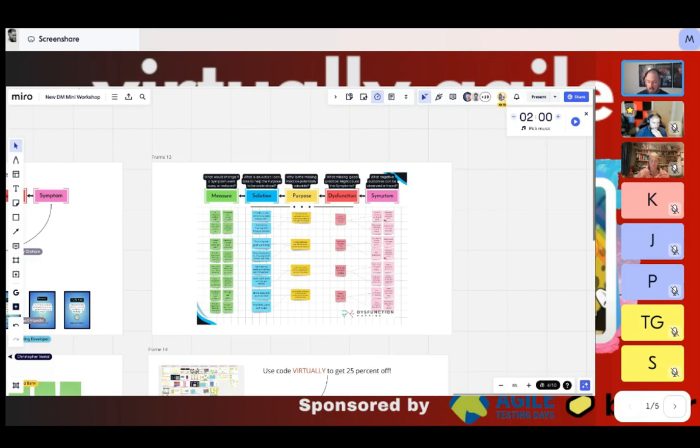Sarah asked, how do you tackle these things? Do you do it all at once? Your judgment is going to matter here, but I would generally suggest picking 1 or 2 things at a time, because if you try to solve too many things at once, you won't necessarily know how they relate. Does this thing fix that thing, or was it actually something else? So you might come up with lots of ideas, but pick 1 or 2 things to take a small action against and then reflect. Always try to aim at what you think are the most impactful things. The things where the largest number of symptoms lie is usually going to be a great way to do that.